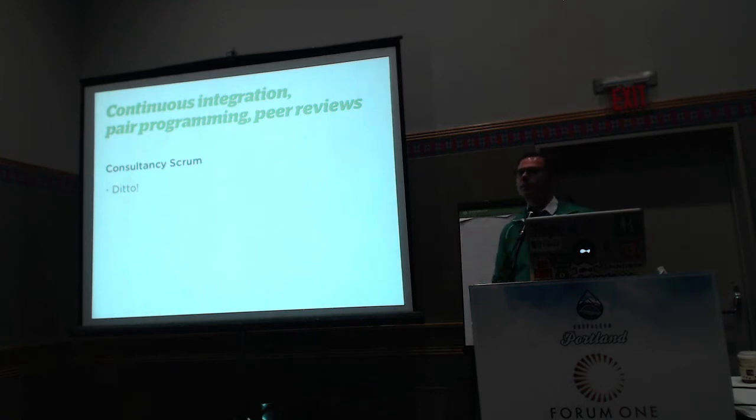So does that happen for every single little change that somebody does, or per feature? Every story. Yeah, so it's neither every change nor every feature, but rather every story. That way you can also demo every story much more accurately, because you simply switch to this code branch and say, we've done only this story in this code branch. We're going to demo it. And there's much less risk of all of that code conflicting with other code that's been done in that sprint.